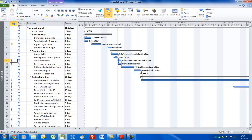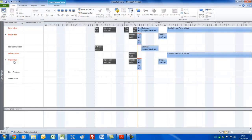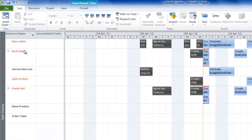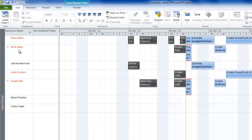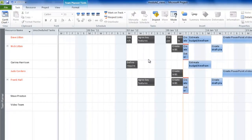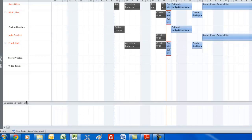If you go to page 26 of the step-by-step guide, you'll find details of the Team Planner view. This is a brand new view for Microsoft Project 2010. It shows here resource names - those in red are over allocated. It shows the time frame when the tasks are scheduled to happen for each individual. And for those that are over allocated, in the case of Nick Lytton, you've got a little red bar above and below the tasks that are causing a problem. It's also got unassigned tasks, which makes this quite a useful view.